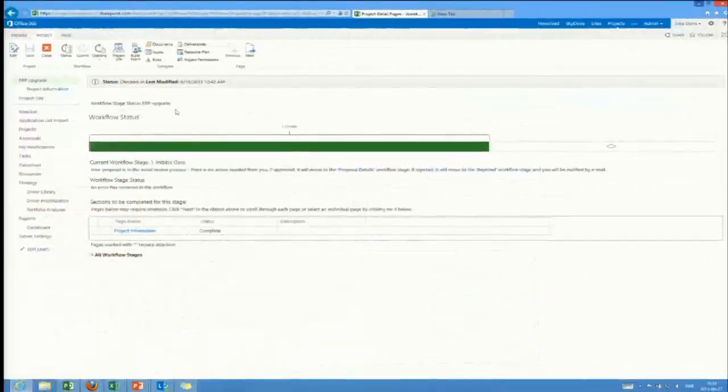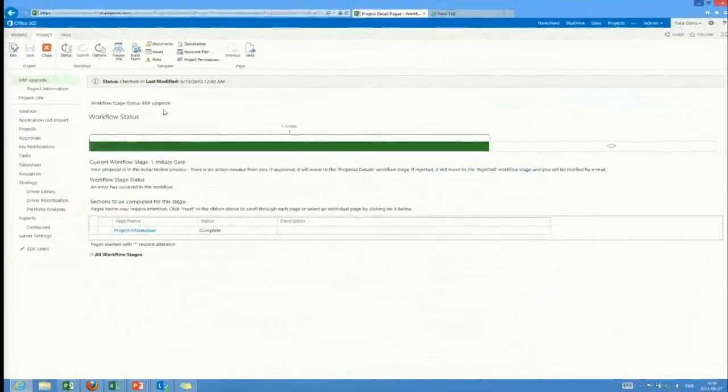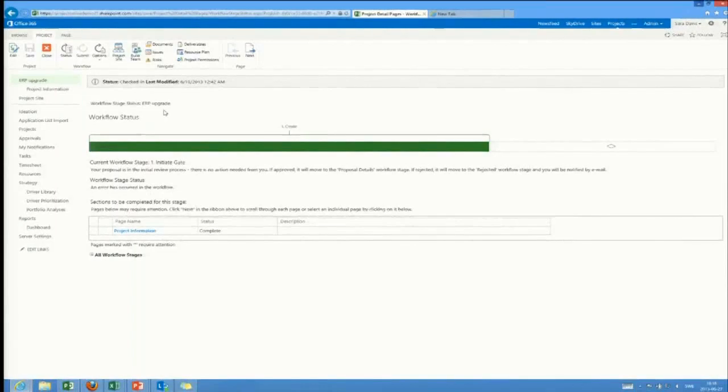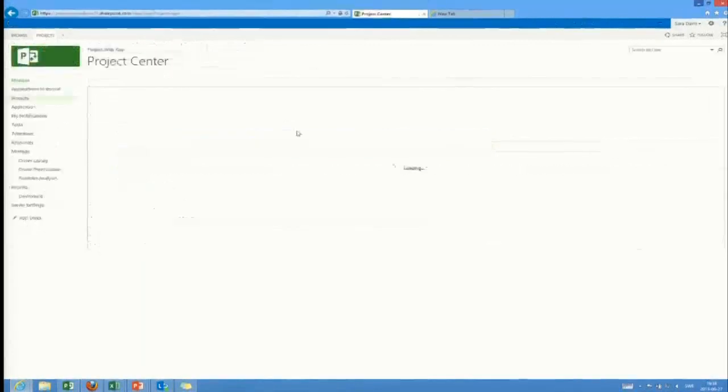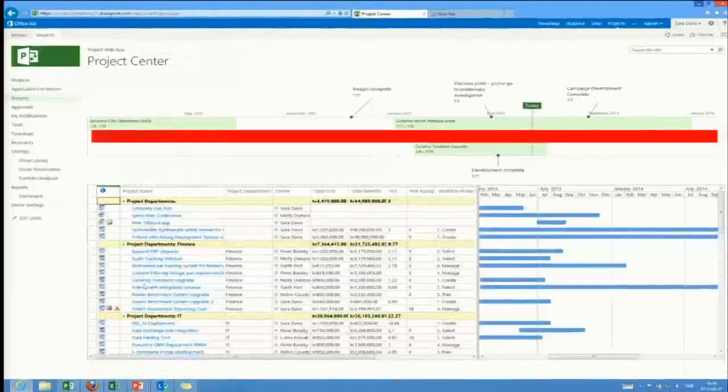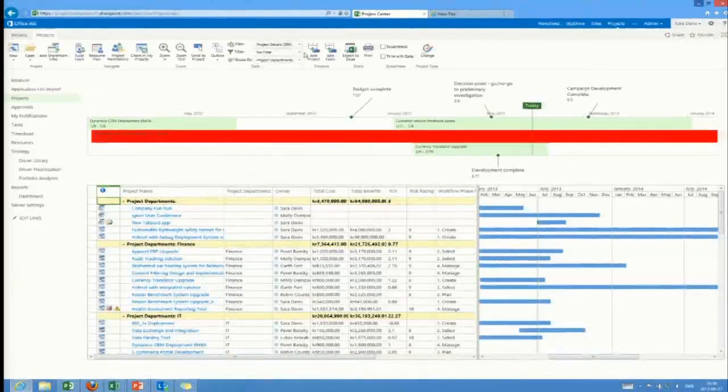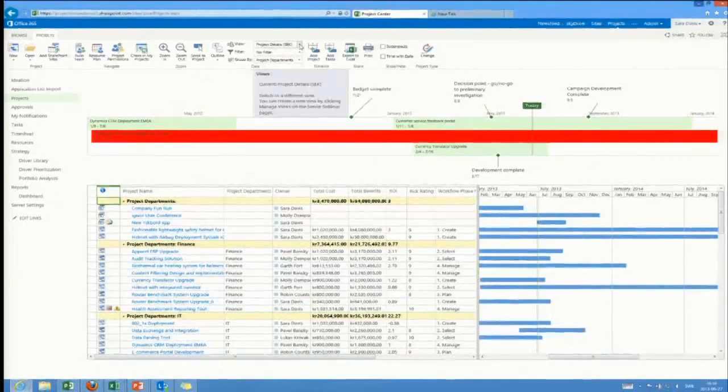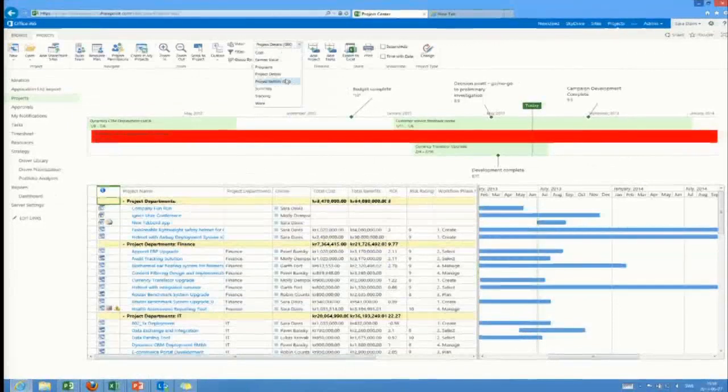We'll show that later. In this organization, we have a workflow associated with all our projects. We have a tollgate model. They have to go through a create stage, an initiation stage, etc., etc. And that stage model essentially is something you can configure exactly the way you want. In order to find a project that is not in the create stage, I switch view now to something called...